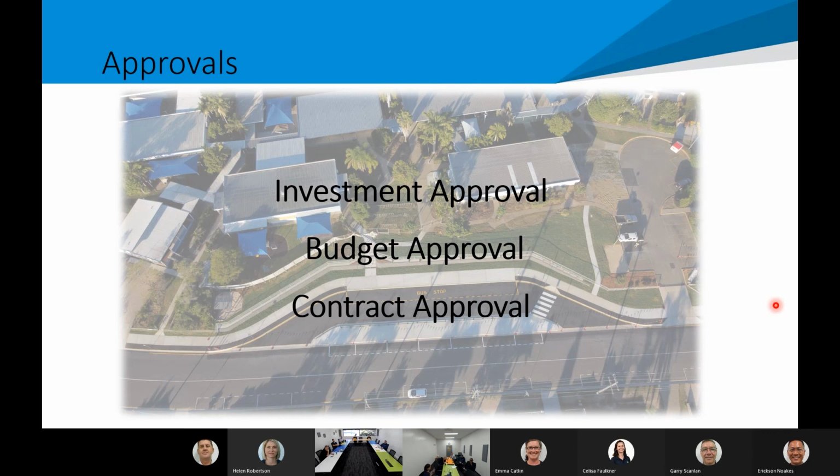So when I think about this fundamentally, you need a gate decision or an investment decision and a budget approval in the sense of adopting a budget for a project. Could happen in either order. So remembering that a capital portfolio is giving a forecast of the project. It's saying, we think we're going to need this amount of money in these years. At a single snapshot in time, we adopt a budget based on that forecast. We say, we think for this project, we're going to need $1 million because we think it's going to be in these phases at this time.